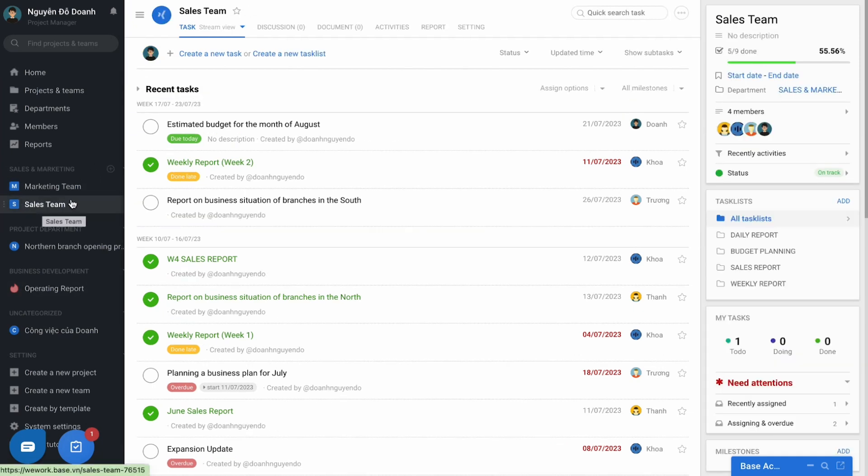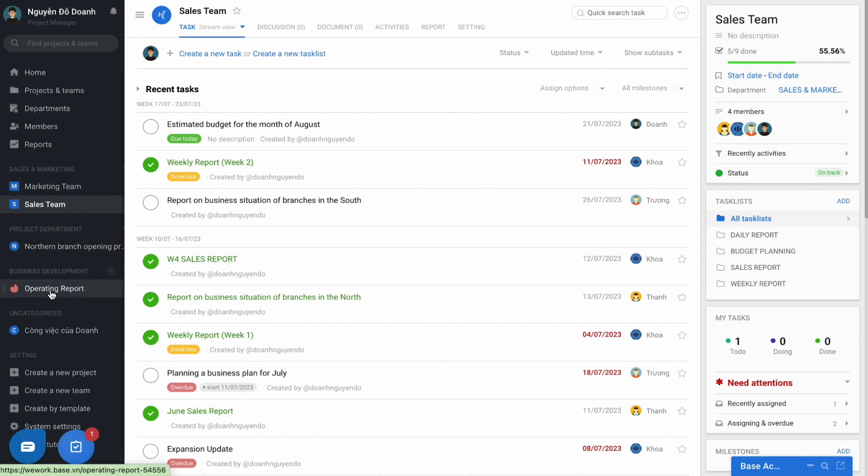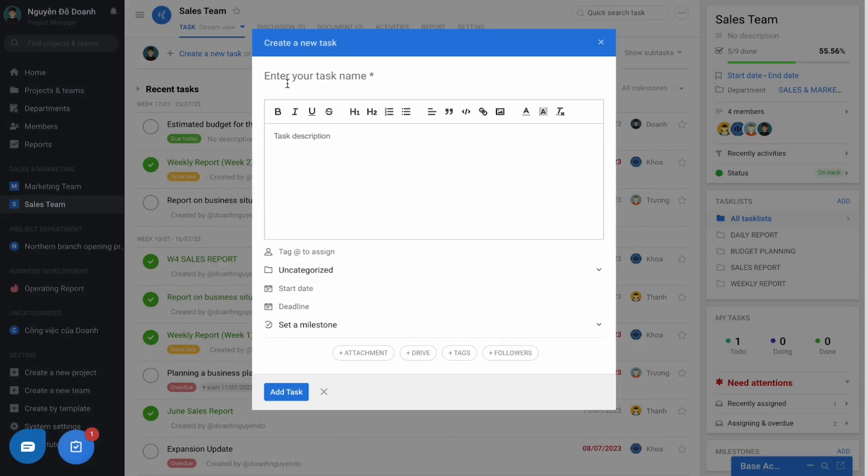In other words, according to the basic principle, every task on WeWork must be arranged in a project or team. Select the create new task button, fill in all required information with the following factors.